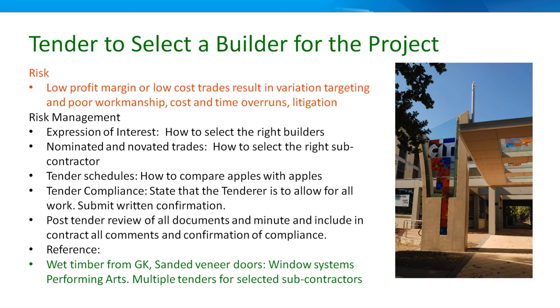Well, that may still happen. The client engages the architect when it's an architect-led project. So that's the first point of suing, and then professional indemnity insurance responds, and then that company goes after the product supplier, the builder, the roofer, everyone. And that's what they do. But in that previous example, we had no one suing anyone.